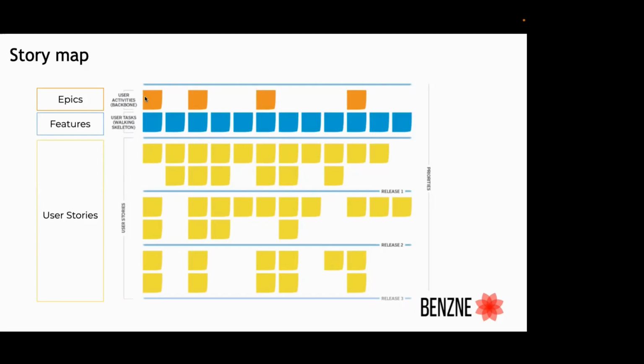The third phase is getting deep into each and every feature. With respect to this feature or capability, what all can a user do? We brainstorm, we have a divergent discussion, and note down all the activities or user actions which we need to provide, or which we think we should provide, under that feature. So once this bi-directional map is ready, this is when you start converting all these yellow tickets into user stories.